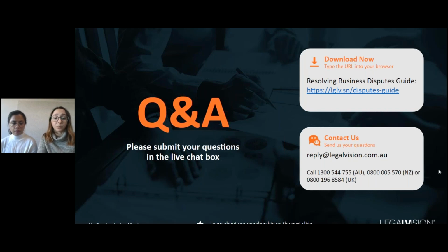And if there aren't certain procedures, make sure to the best of your ability that you obtain some sort of acknowledgement or approval in writing, whether by email or even just an email confirmation of some verbal discussions. The main thing you would need to ensure is that the other side knows what work you're doing and why it is absolutely critical that you need to do it before any further works are continued, and see if you can get some sort of agreement from then on. Otherwise, if you don't want to proceed with the work, you would need to invoke the dispute resolution clauses in your contract.